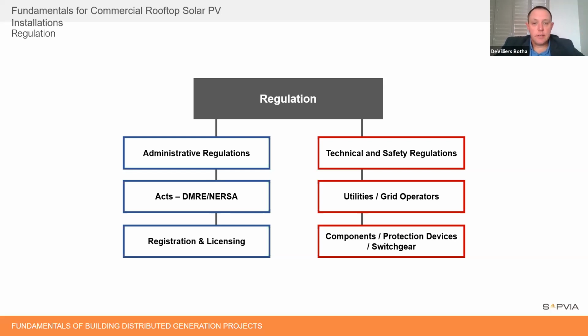Registration is required for each system larger than 100 kilowatt. It's registration directly with NERSA. It's only a 200 Rand fee at present. There was a bit of a stall in that process, but an hour before this, I got confirmation direct from NERSA that the registrations are not stopped, because there were rumors that the registrations have stopped pending the Schedule 2 needing to be fixed, because there was a slight drukkersduiwel, as they put it in Afrikaans. There was a misprint where the bottom of the pages were cut off, and it was said that NERSA is waiting on that finalization before any registrations proceeded, but that would have been against the spirit of us being an energy poor country. So I confirmed with NERSA, the registrations are proceeding.